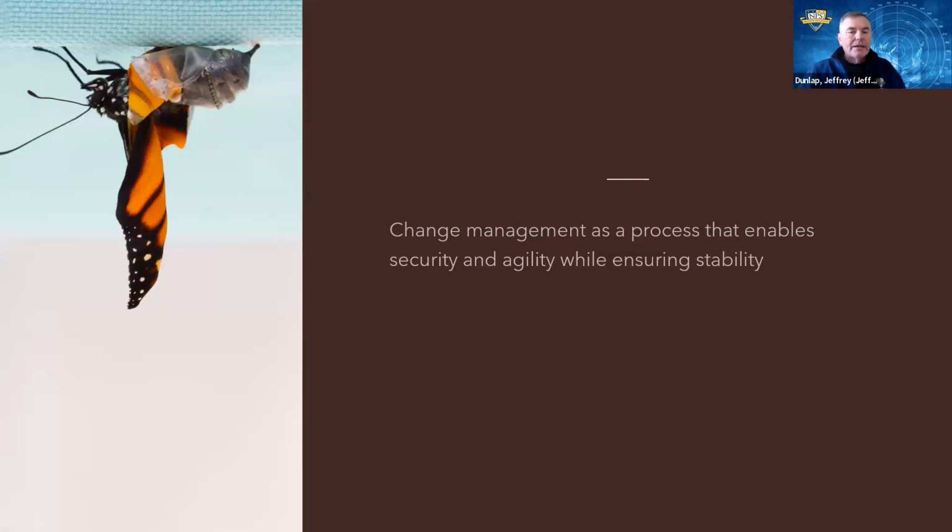So I get a certain amount of time, and I get to a minimum viable product. This is all pre-negotiated with the user, right? They're like, okay, we think if this is the minimum viable product, and it demonstrates that you can actually do this development, there you go. And then we say, we're going to continue to add value, continue to add features. We may change stuff, right? We may see a feature is not working well. We may pull it back and redeploy that feature with some sort of change.